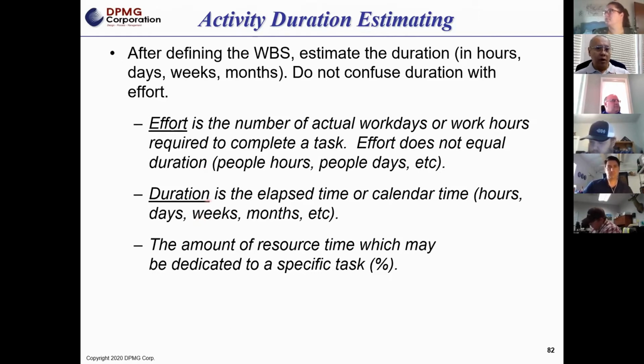As we calculate effort, and especially how we calculate duration, we need to understand the availability of the resource. Let me give you another simple example. On any given day, Krista only has half a day available to work on anything other than what she's dedicated to do. That means she has 4 hours on a daily basis to work on your project.